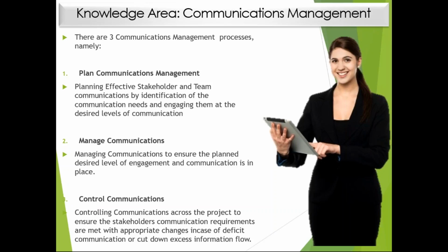If you're going to send out the emails, then what is the frequency of sending them? Is it possible for us to send out emails, or should we follow physical mail? For example, if it's a defense project, you won't be able to send out emails, right? That's prone to get hacked. In that situation, you would need to choose a different technology. So what is the mode of communication? What is the method of communication? What is the technology that you're going to be using? If any change is required, how would you be doing the change? All of that gets mentioned in the plan document.